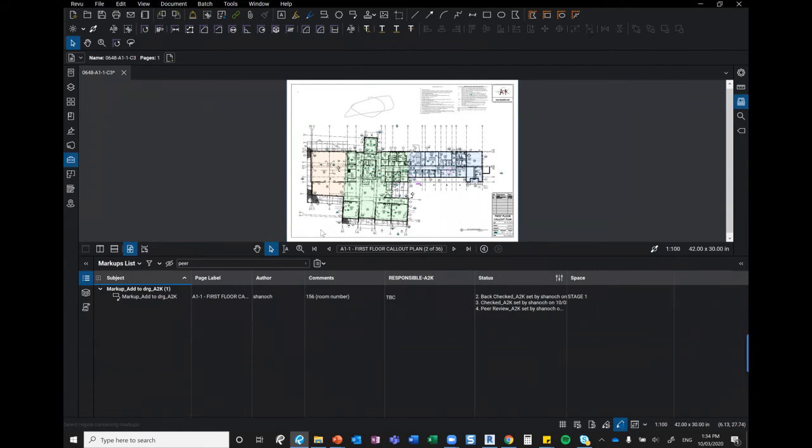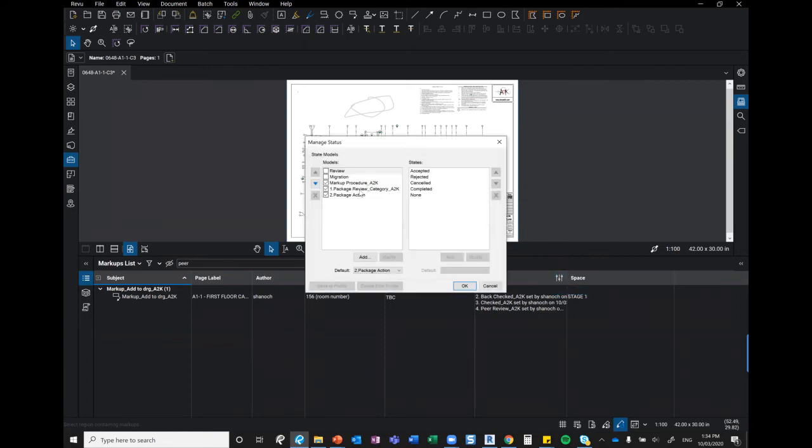So it's interesting when we look at things with infrastructure, their statuses, we also have different categories. So for them, it might be, it's a level 1 text issue. Number 2, it's a site clash. So it's not a hard clash. It might be a construction sequence clash. It might be like, well, we're going to have a crane here, or a temporary crane, or maybe there's going to be hoarding in this place, whatever. We can say it's a low-level issue.